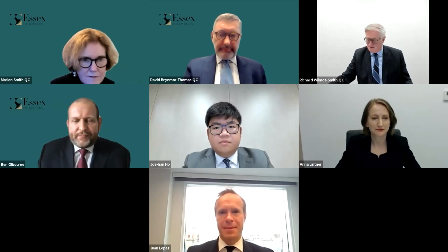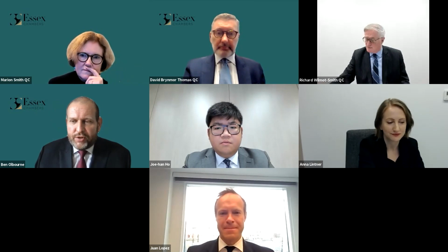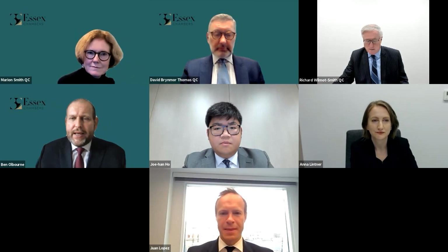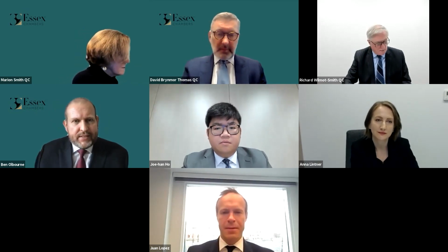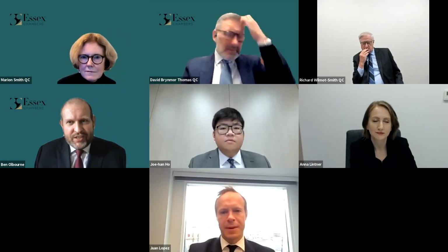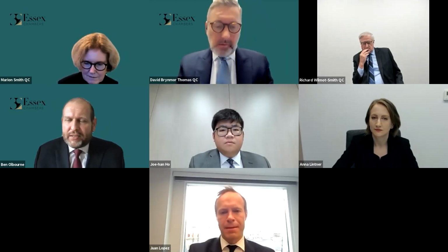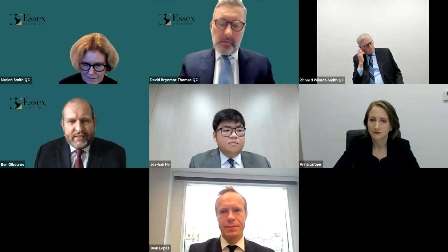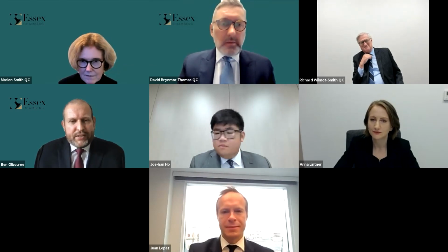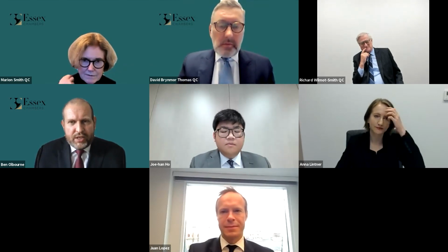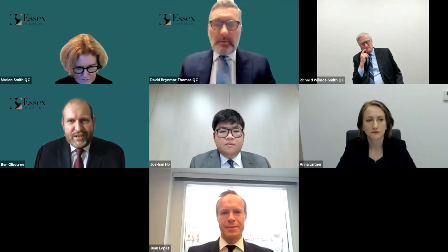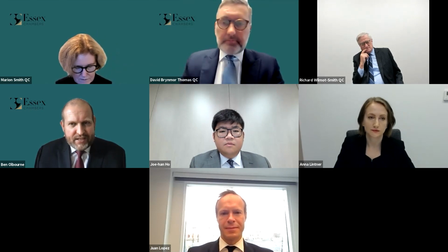Thank you. Just to focus what I'm going to say, I'm tasked to consider the question: to what defaults other than delay, and to what remedies other than liquidated damages for delay, does the doctrine against penalties apply? And the answer is simple and can be stated concisely. The penalty doctrine conceivably applies to pretty much any default in respect of which there is a contractual stipulation addressing the consequences of that default.